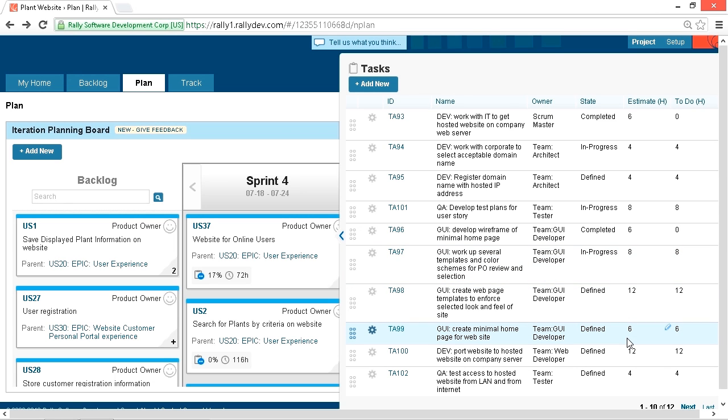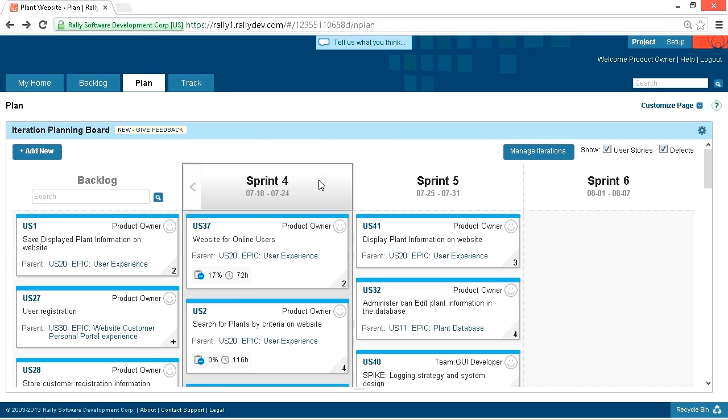When the sprint planning meeting is complete, the sprint backlog, here, we have two sprints showing, the sprint backlog will hold the team's plan for turning the PBIs they committed to completing in the sprint into potentially shippable functionality in the product increment. Now, during the sprint, the sprint backlog is used to track which tasks are in progress or completed.